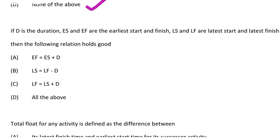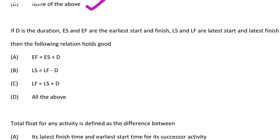Next question: if D is the duration, ES and EF are the early start and finish, LS and LF are the latest start and finish time, then which relation holds good — option A EF = ES + D, option B LS = LF − D, option C LF = LS + D, option D all the above. The correct answer is option D, all the above.